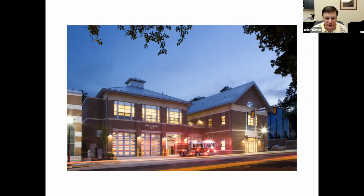I was just talking to a contractor today. He's just starting a locker room renovation for us at a police headquarters, and it's $1.4 million worth of scope. So it's not a big project. It's taking an existing locker room, demoing it, and renovating it. But they used to buy things as they needed them and bring them to the job site. The approach now is, give me storage for stored material, and I'm buying everything in the first 2 weeks. I'm just buying everything.